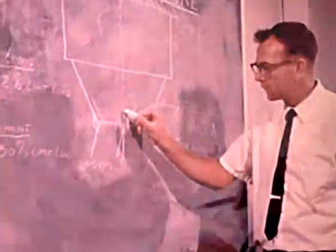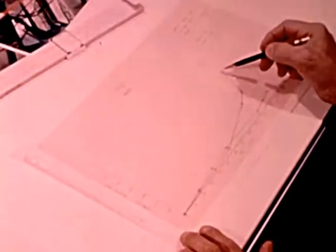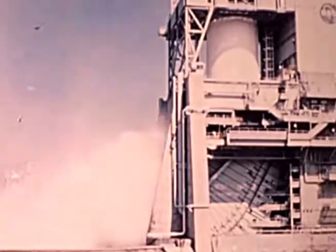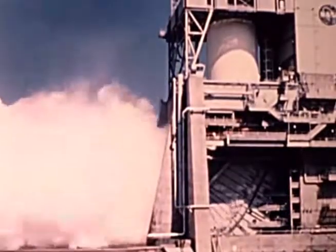Further analysis determined that the oscillations could be dampened by earlier shutdown of the second stage engine. Ground tests conducted during the static firing of the second stage for the Saturn 508 verified the feasibility of this approach, which was then successfully used on Apollo 10 and will be incorporated in Apollo 11.